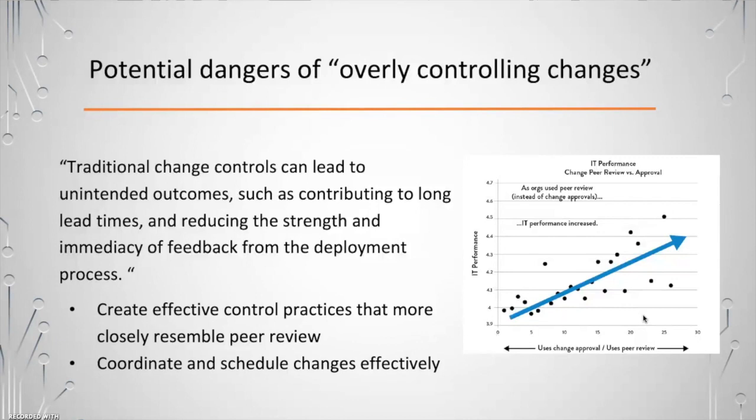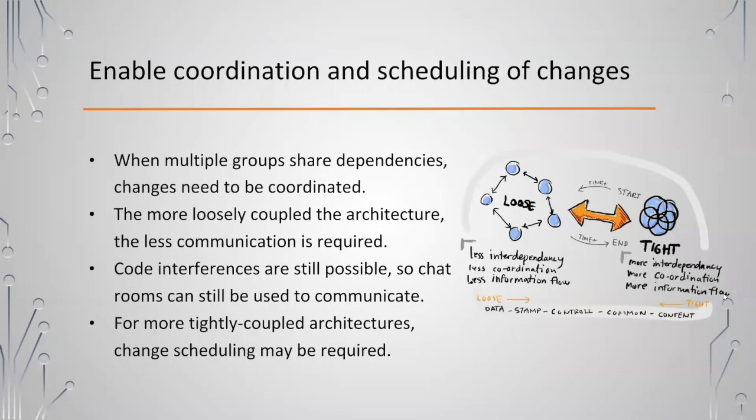We also need to coordinate and schedule changes effectively. Enable coordination and scheduling of changes. When multiple groups share dependencies, changes need to be coordinated. This is so that more than one change isn't made at the same time and you end up overriding something.